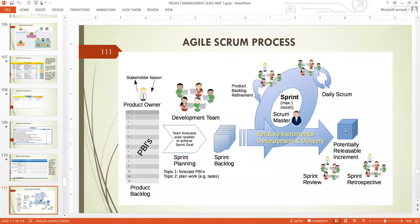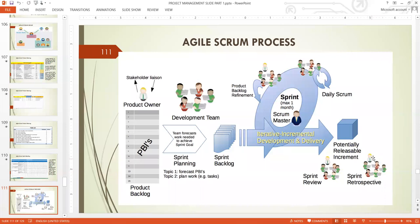At the end of 14 days, the team should produce an increment — a piece of software. They bring that piece of software to the stakeholders in a sprint review or sprint demo, where they demonstrate what they've done. Once everybody's happy, they deploy that small increment. They come back as a team for the sprint retrospective — a two-hour meeting reviewing what went well and what needs to improve. Then they come back and pick another item from the backlog to work on, cycling and cycling continuously.